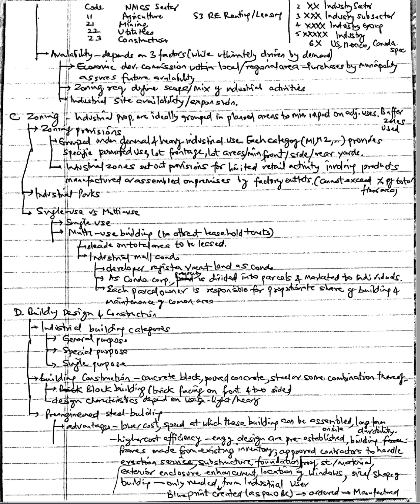Design build scenarios can be complex given the particular needs of the users. Commercial brokerage activity will often include not only detailed costing, like land and building costs as well as interim and permanent loan costs, real estate commissions, closing expenses, contingencies, but also detailed pro forma statements outlining cash flow projections, present value estimates, and internal rate of return.